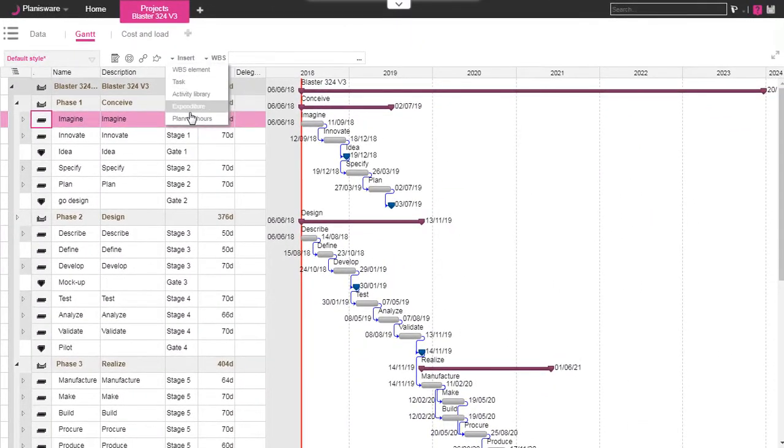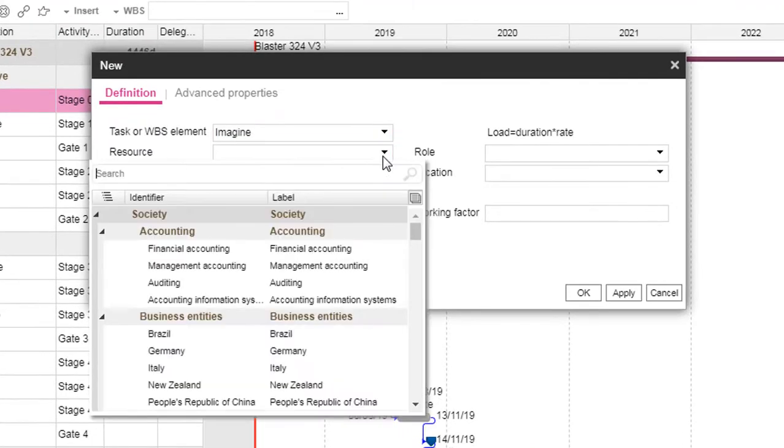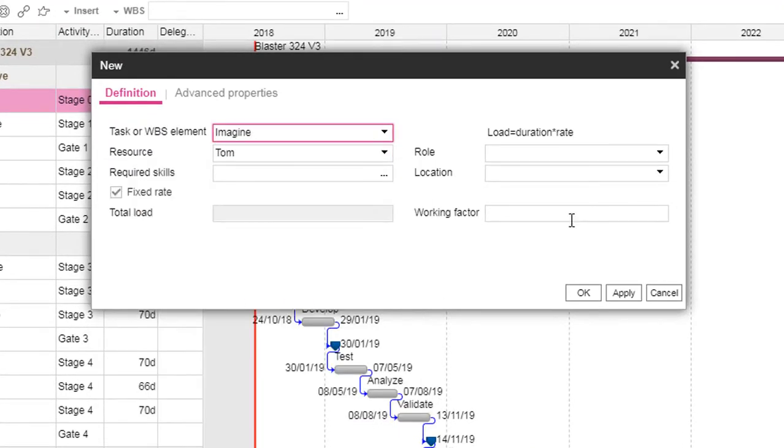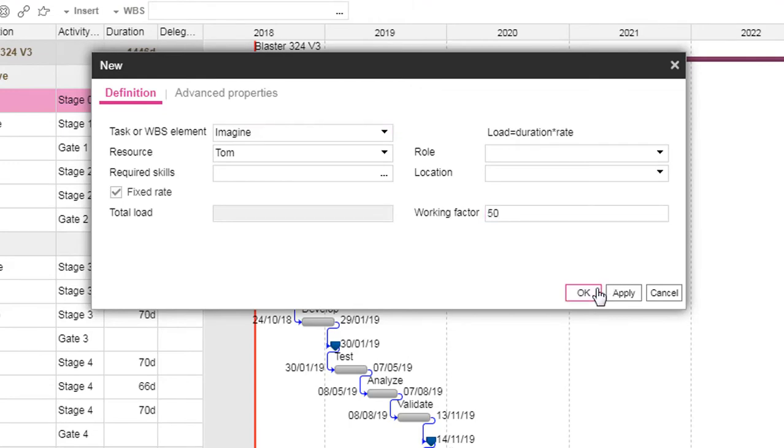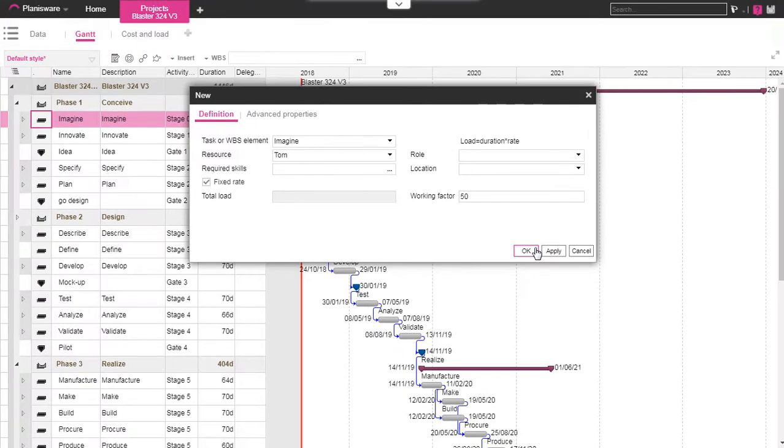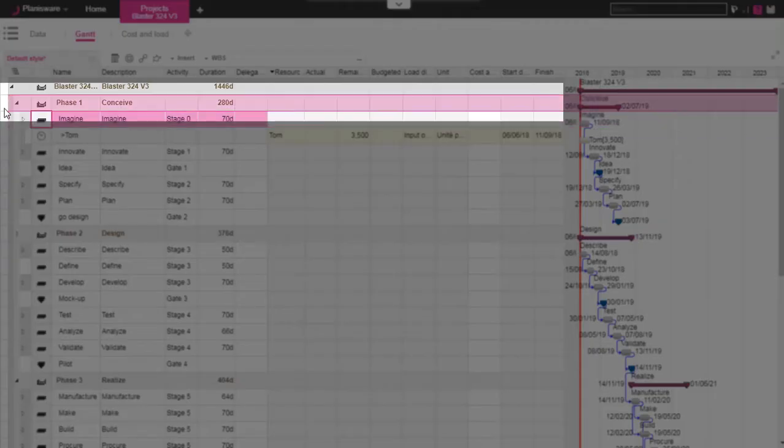We can also create planned hours using the form. We select the activity, choose the resources, and enter the load or working factor depending on the planned hour type you need.